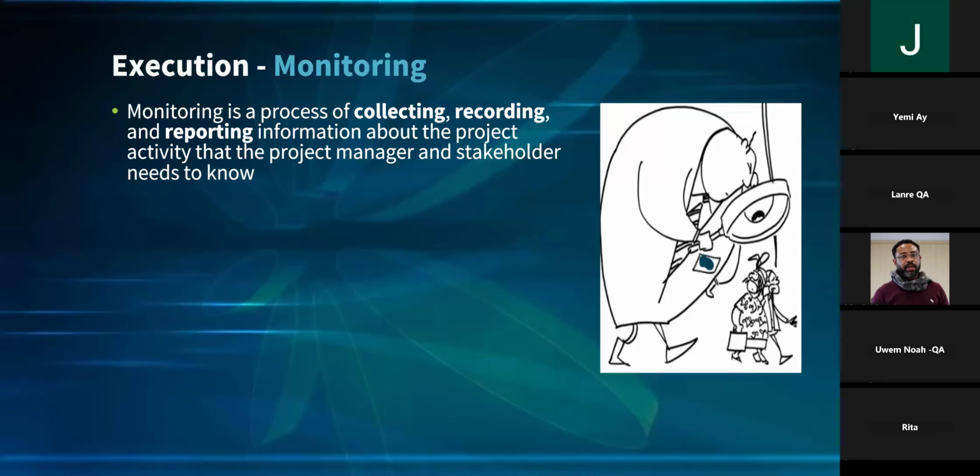In the real world, even the project manager will look, since you're short of 50, it's better we start pulling people into the team. Exactly. And how will he know? Because I've given the visibility, I've given the metrics, everyone is kind of aware of what it is. And also it's been written in my test plan to say, I might need people at my execution phase. So now I need them. So they will come in.